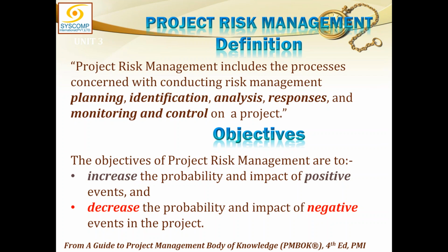Damage I'm saying for the negative, and benefit for the positive. So probability and impact multiplied together will give you the overall exposure of the risk.